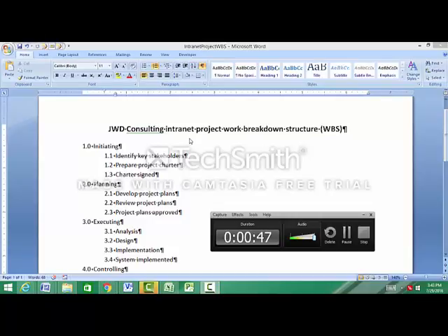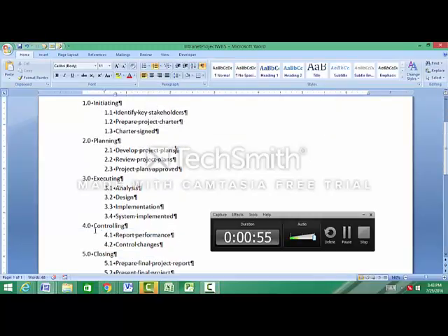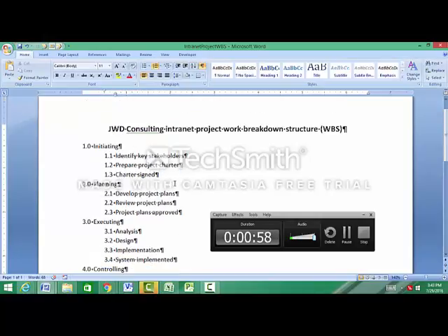Any IT project can be broken into 5 main deliverables: initiating, planning, executing, controlling, and closing. Each of those deliverables can be further broken down into manageable chunks, what we call tasks and subtasks. It is easier for the project manager to manage each subtask separately. He can assign schedules for each task and resources, and measure the cost for each. It applies more control over the project.